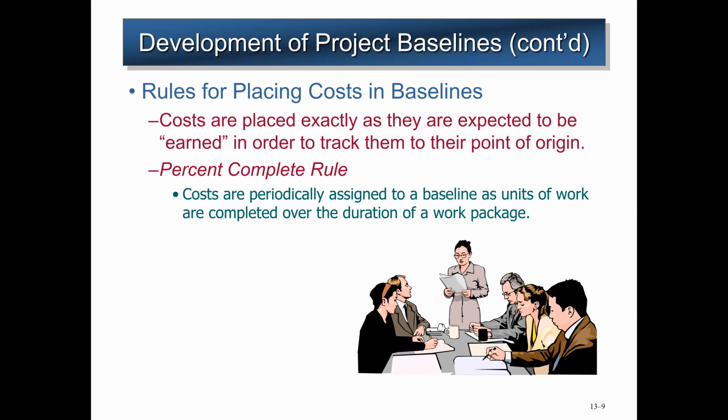One thing also we need to know is to monitor and also control the project work inputs. So this will be the inputs of the process, which include the project management plan, performance reports, enterprise environmental factors, organizational process assets. And enterprise environmental factors of a process can include such as standards or work authorization system, the risk tolerance of our stakeholders, and also the project management information system.